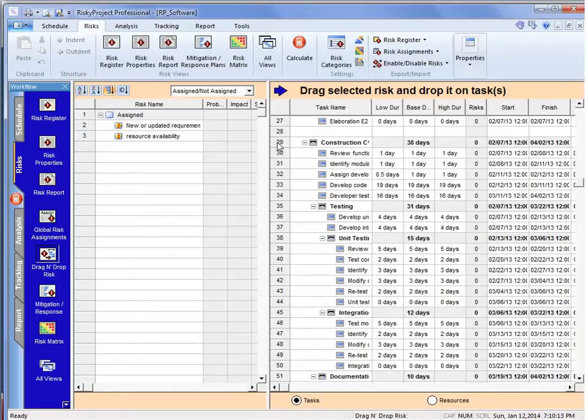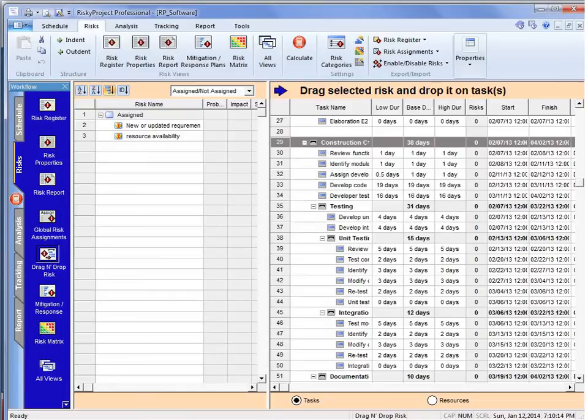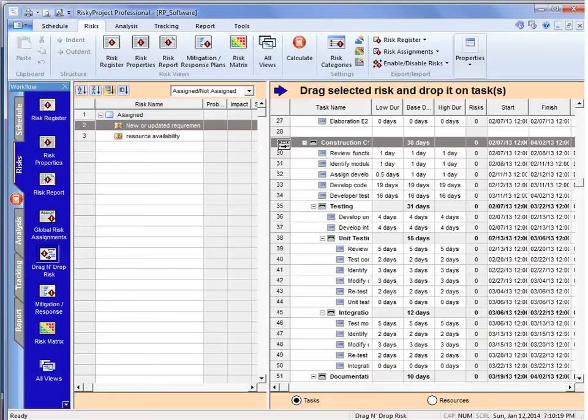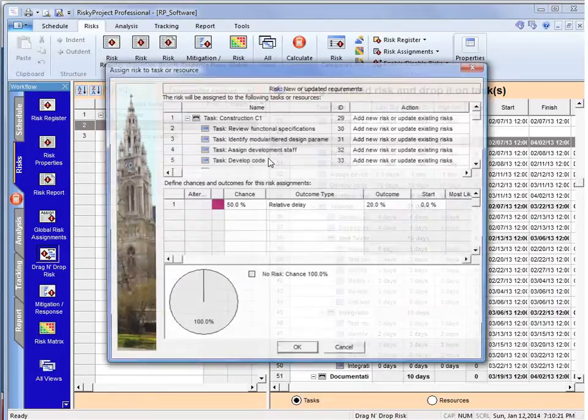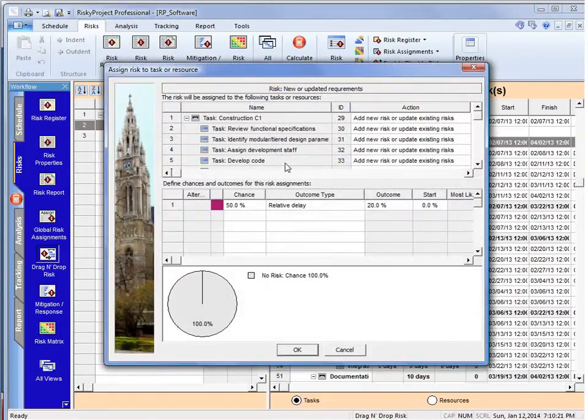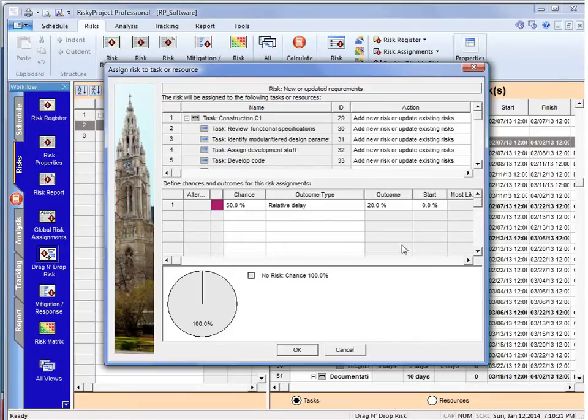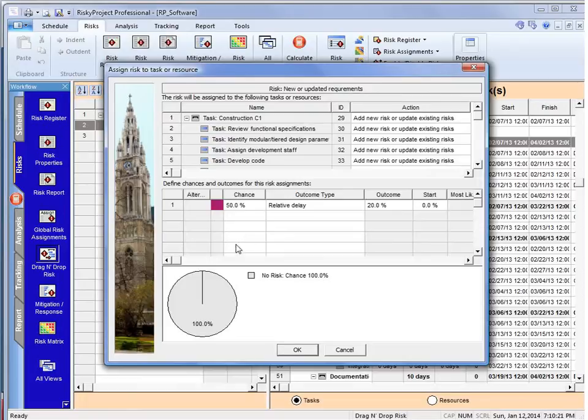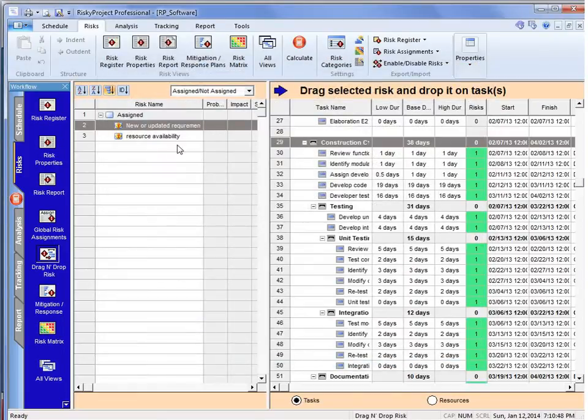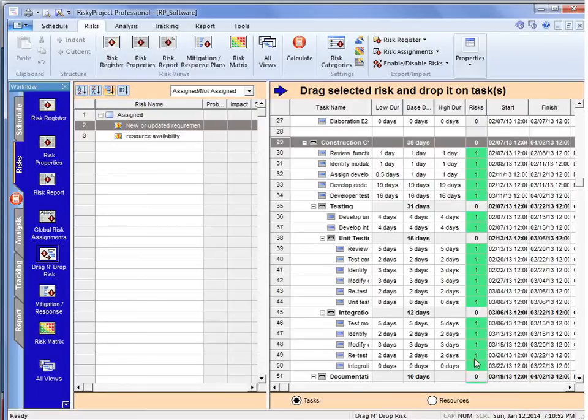Now, I'm going to select the construction and say that there's a new or updated requirements, and I'm going to drag that risk over to the construction, and it's going to assign this risk to all of the activities on the construction. Now, one of the things I'm going to say is this, it's picked up the chance that we've had before that there's a 50% chance of a relative delay. So the existing risk assignment, it picks that up, and we can just click OK, and that risk now has been assigned, and it shows us right here that there's a risk assignment that's been assigned to all of those activities.